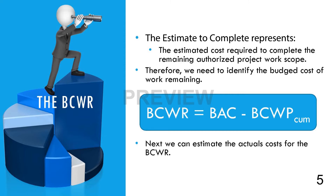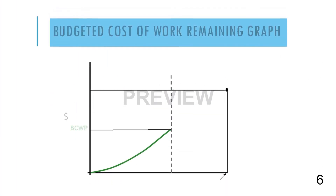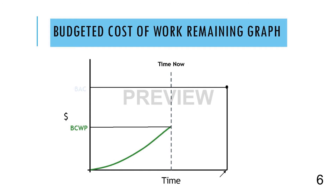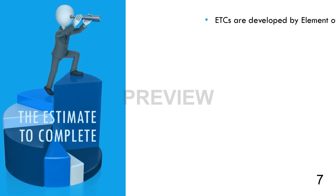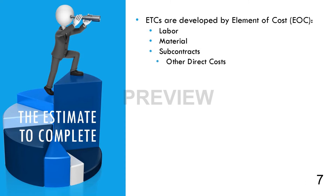We can focus on the actual costs required to complete the BCWR. Shown graphically, we can see the relationship between the budget at completion, or BAC, and the budgeted cost of work performed, or BCWP. The difference between these two elements is the budgeted cost of work remaining, or BCWR. The estimate to complete the remaining work scope is developed at the element of cost level — meaning labor, material, subcontracts, other direct costs, etc.